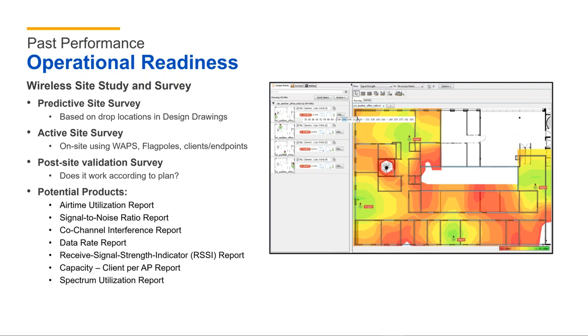So I won't run through all of the different areas here in terms of the details, because I don't want to bore anyone. But the important thing to note is there are ways, working with the construction team way ahead of time, before anybody even gets into the facility, before construction is even done, to make sure that your cabling, even your communications and data cables, are placed in the right location for what your needs are.